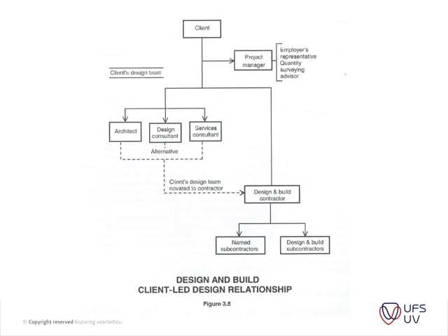Okay, just looking at this one, where the client is the leader, he still appoints an advisor who's the project manager, and then he appoints the architect, design, and service consultants, and the client design team nominated by the contractor then advises the contractor on the design.